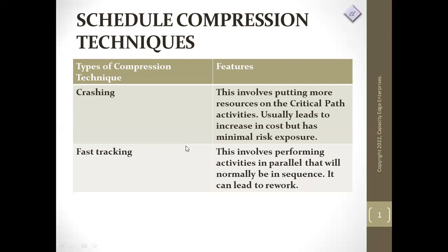Task A, test all the functionalities of the software in-house. Task B, call the user and have user acceptance testing. So it could be that, of course, normally we're supposed to test all the functionalities in-house first before we call the user for user acceptance test. So we can decide to do the two simultaneously, although this is risky. So what we mean is we use the user to test the functionality of the software. We don't test the functionality of the software in-house.